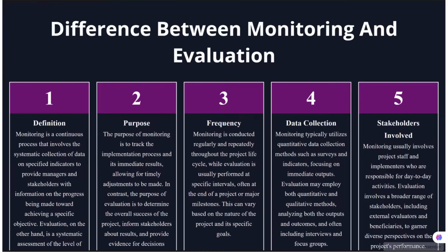We can differentiate between M&E. Monitoring is a continuous process that tracks project activities and progress through regular data collection, helping identify immediate issues. Evaluation, on the other hand, is conducted at specific intervals to assess the overall success, impact, and relevance of a project. Monitoring primarily involves project staff and focuses on outputs, while evaluation includes a broader range of stakeholders and examines outcomes and long-term effects. Both practices are essential for informed decision-making and improving project performance.